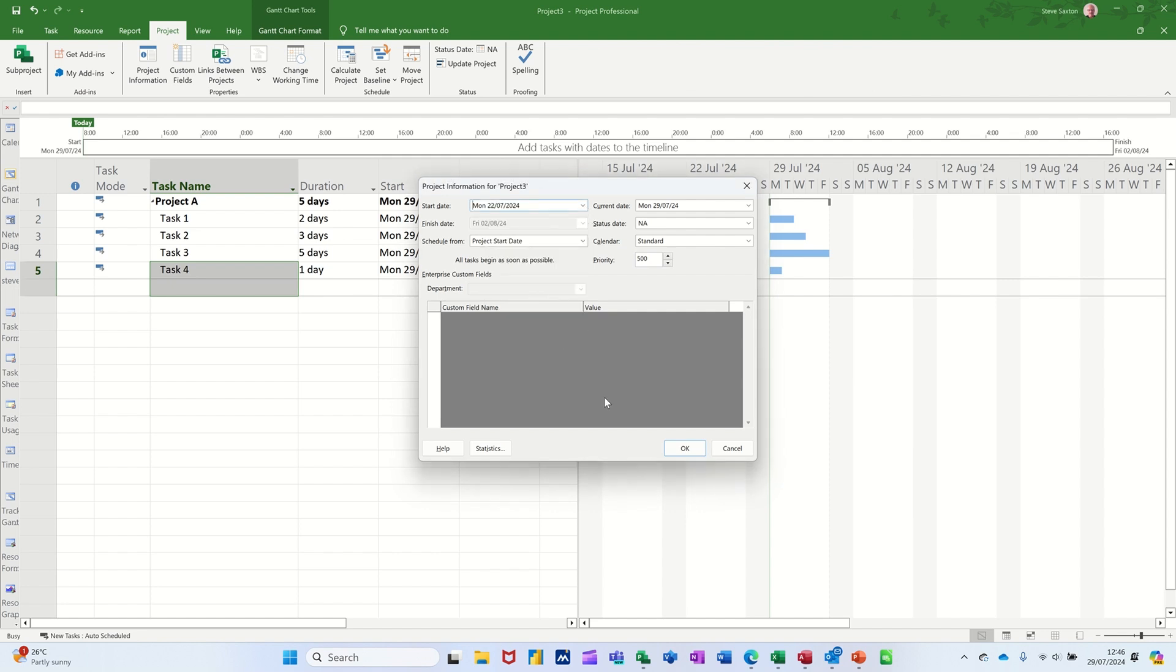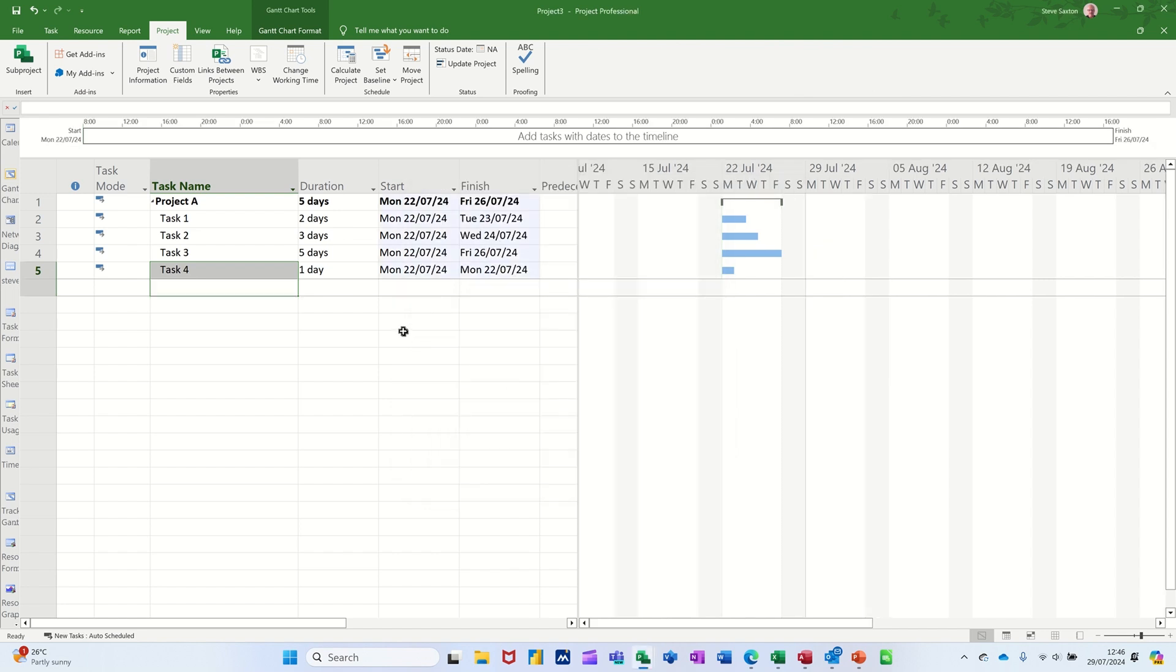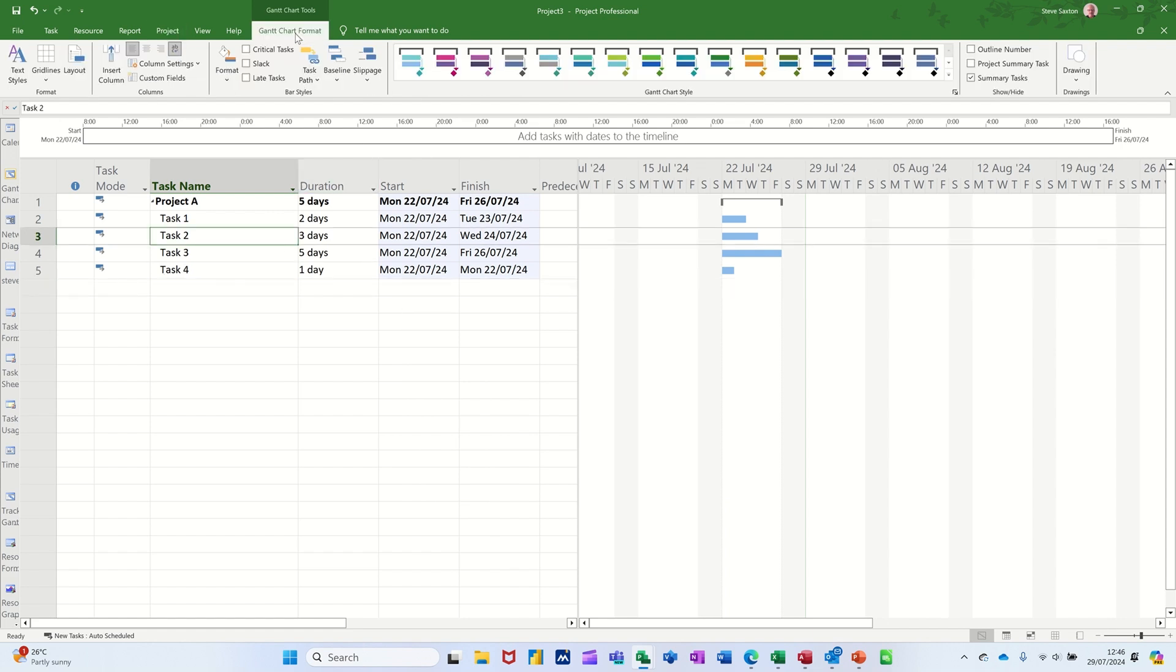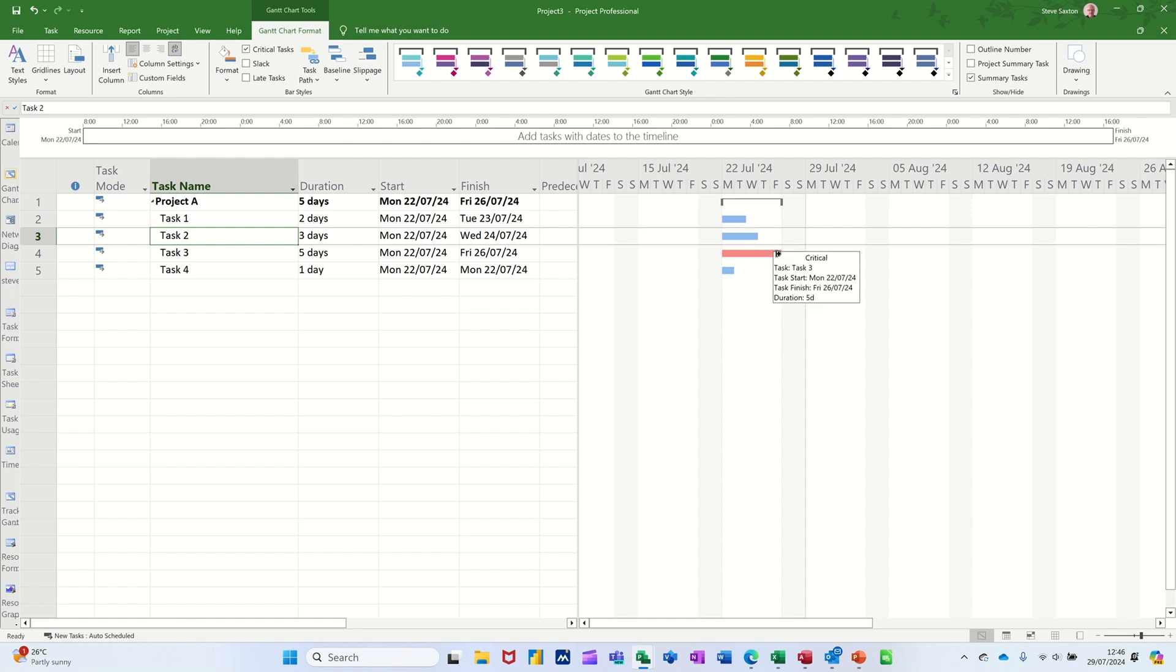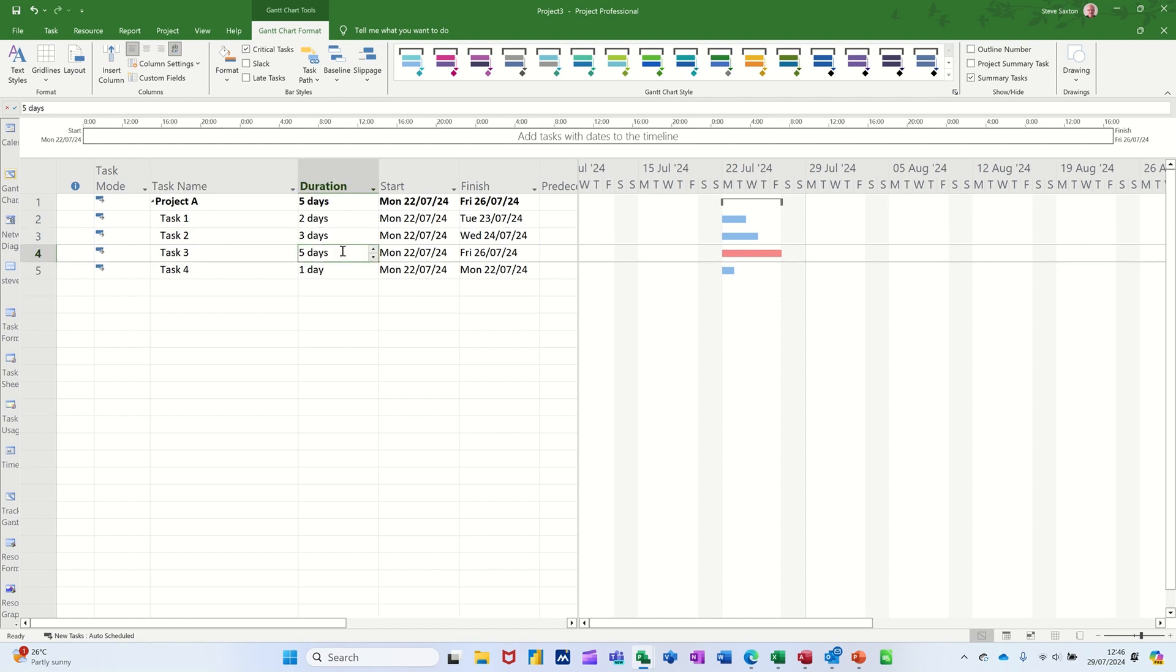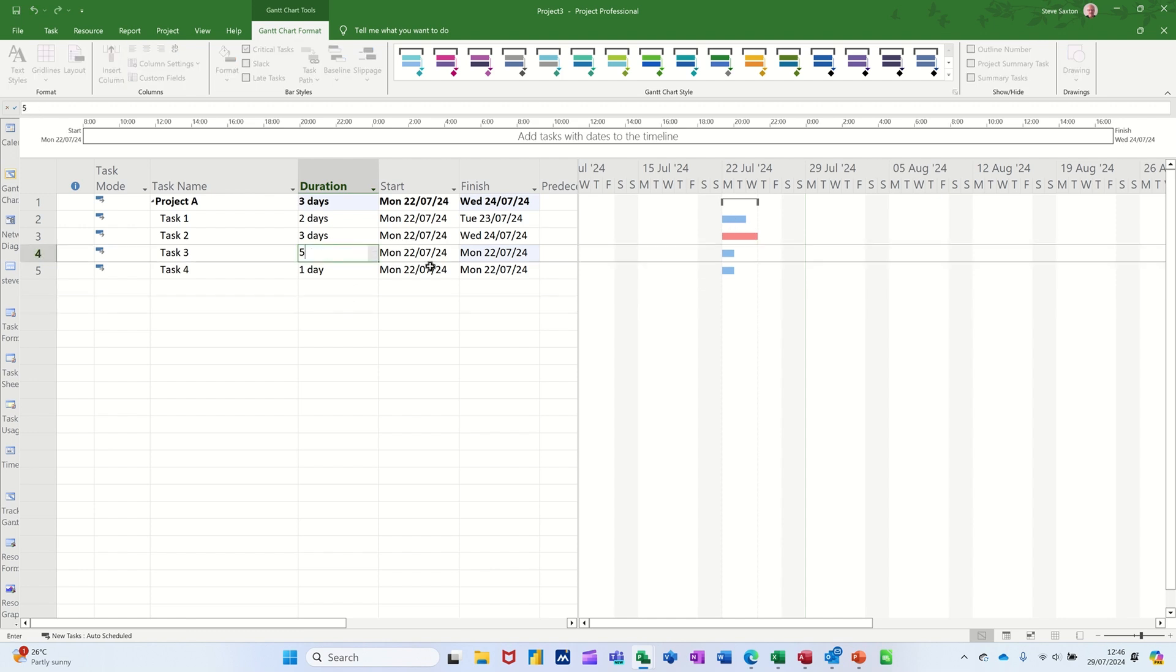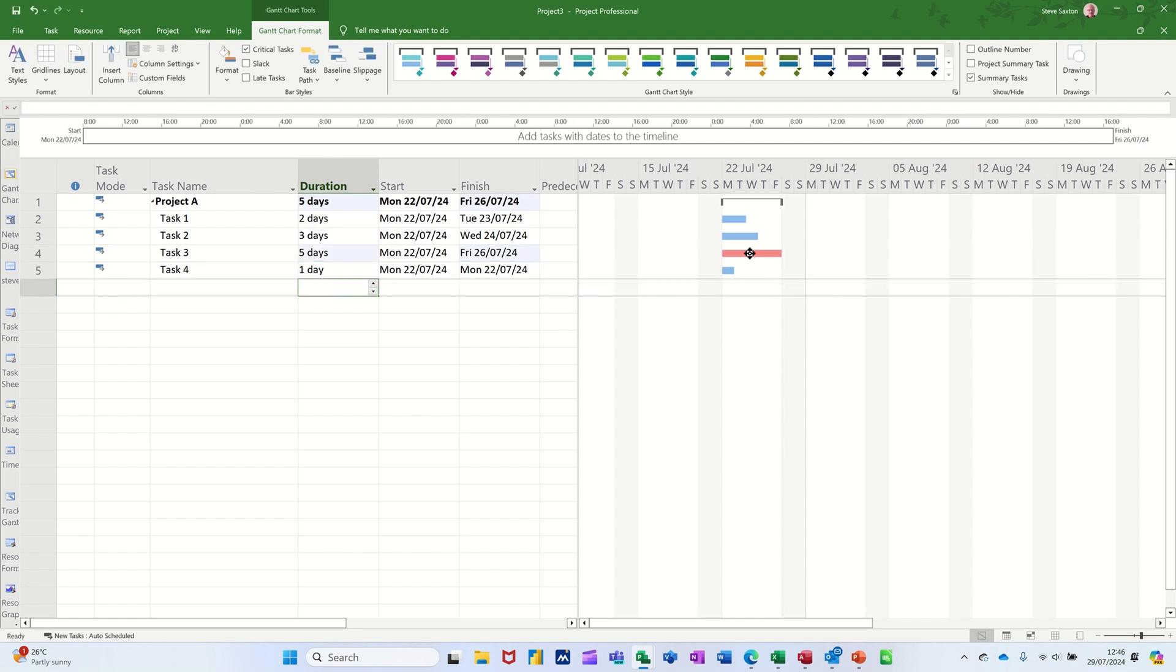Now if I click on this Gantt Chart Format option, you've got these three little tick boxes. If I go Critical, it's only going to show you the one that is critical because it's the longest one. All of these are showing blue because they can go on in any period. If I reduce that duration to one day, these become critical. I'll put it back to five.